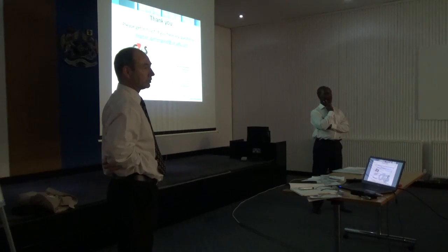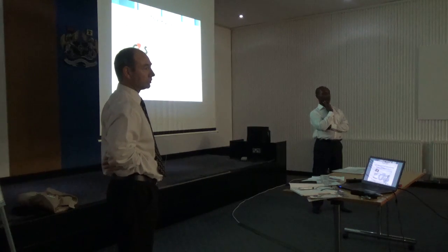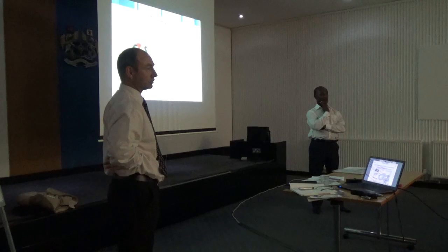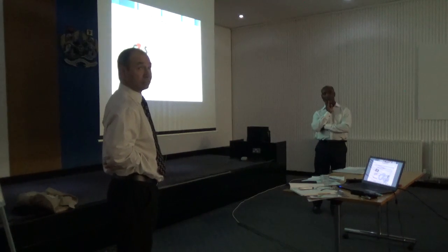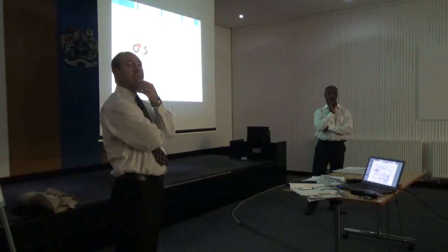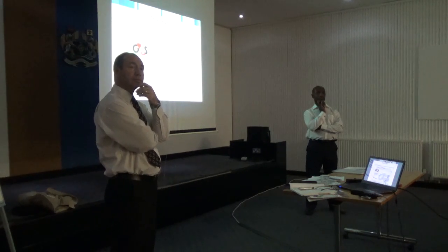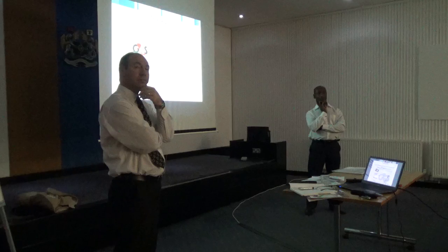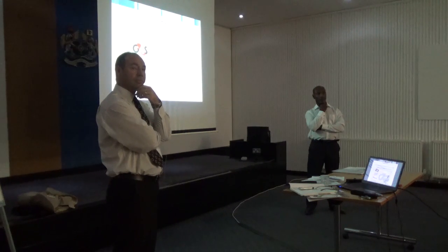Another way you can approach it is by benchmarking price per square metre on different styles of building. That will also give you a very good yardstick in terms of what the maintenance is going to be. Can I just jump in here, Steve? Birmingham City Council, any capital scheme that we do, we get involved in putting together a revenue plan for the life of the building. So nothing gets past cabinet without a revenue cost for maintaining the building for the life of its construction.